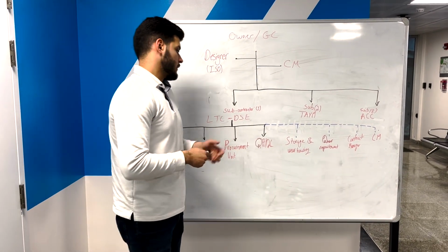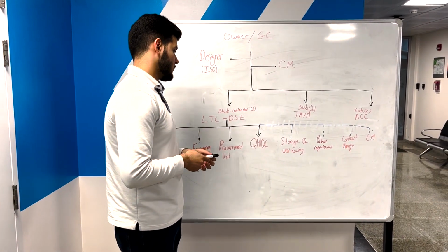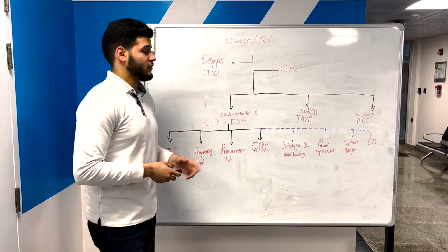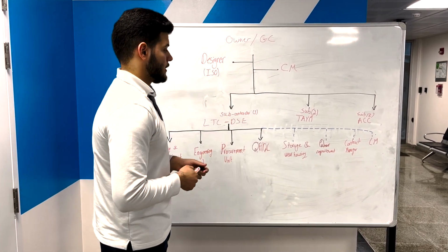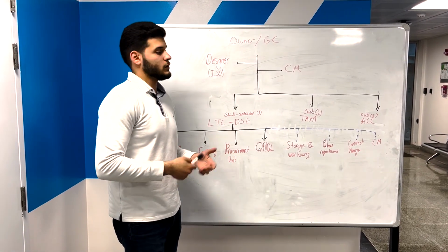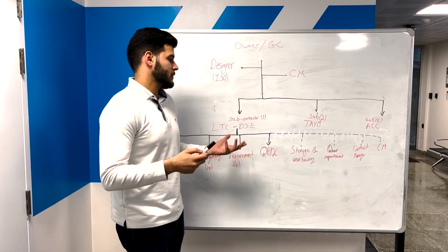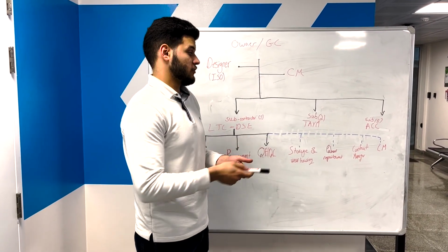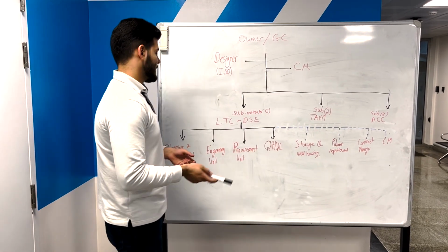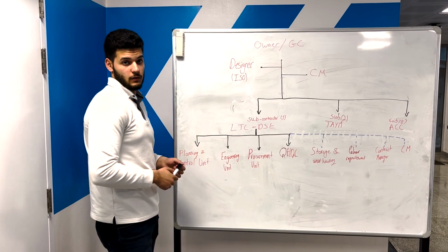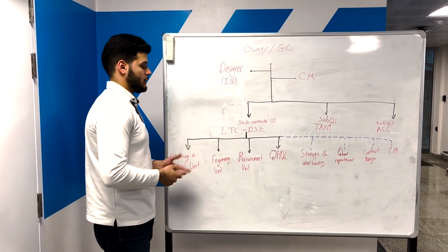Of course, they don't have a storage and warehousing unit because mainly the general contractor here provides the storage and the warehousing for the subcontractors. There is no need for labor recruitment. That's mainly because all the subcontractors have their own labor, own workers, and don't need a recruitment unit. They don't have a contract manager or a construction manager, and that's mainly because the contract management was dealt with by the engineering unit. So they were the guys responsible for that topic.